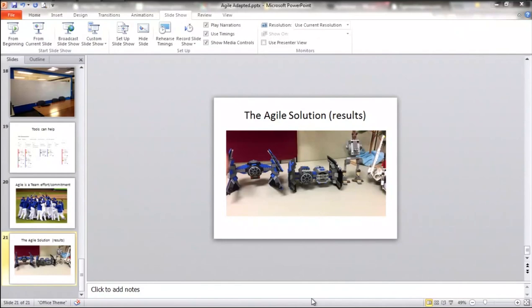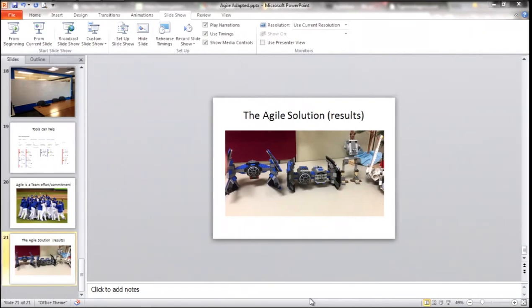And when you bring it to the customer or the stakeholder like that, then they see the trade-off. Again, if you have that triangle where you have your costs and your scope and whatnot, and that scope starts rising, everything else has to diminish.